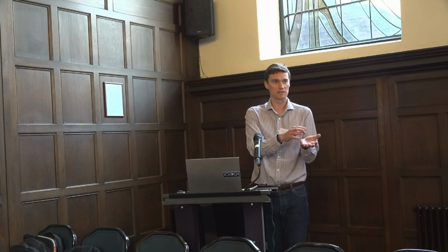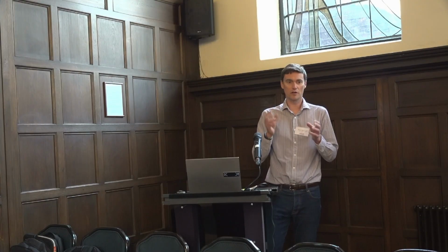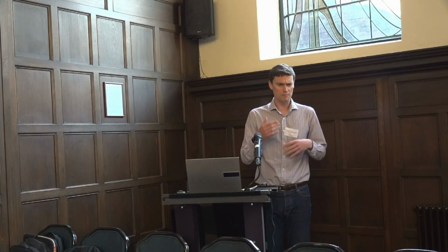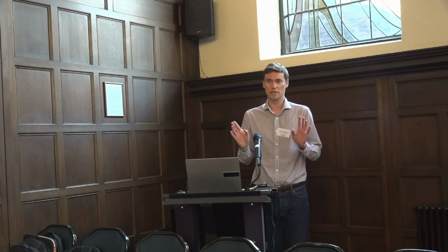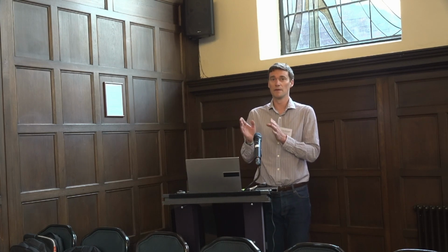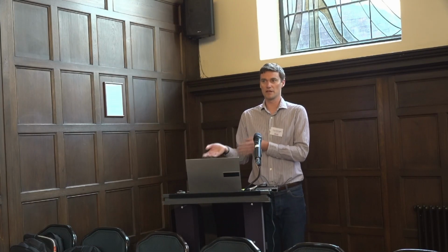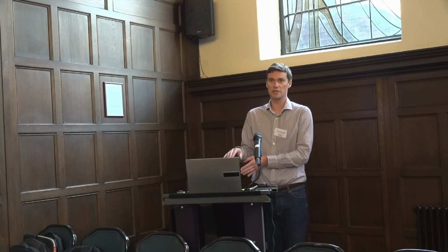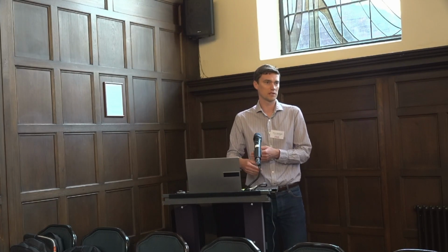Does that make sense? As I say, it can look quite complicated, and you may wonder why you're inputting person days into it. It's purely for that reason, because these overheads are such a significant part of your carbon footprint that if we were to exclude them from any project, we would be significantly underestimating the true impact of that project.